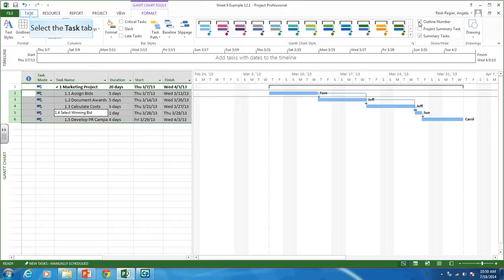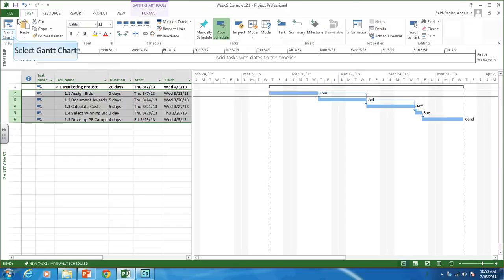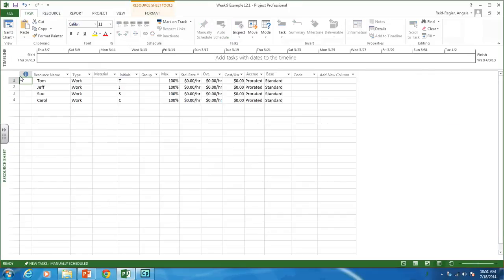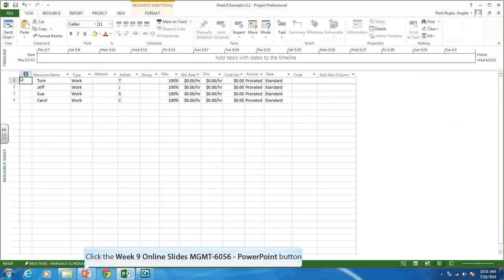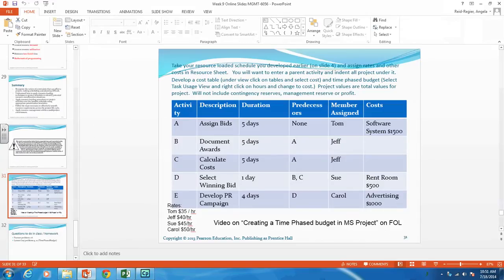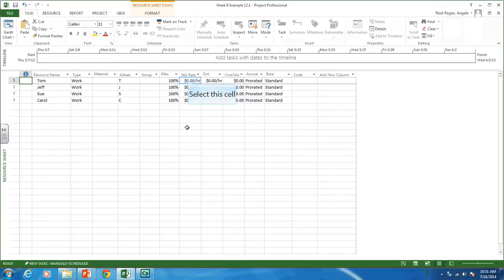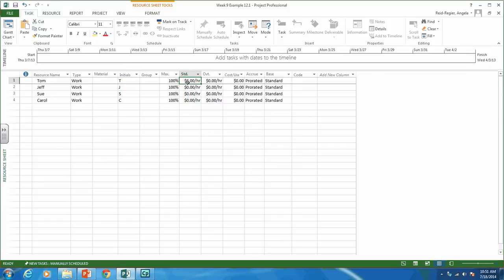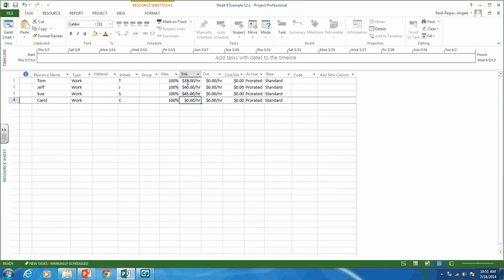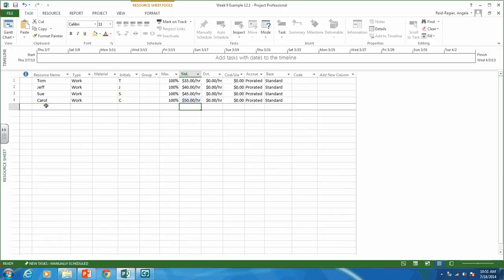Now we need to assign rates. Go to the task tab and select the resource sheet. We're going to assign rates to the different people. From the slide, Tom is $35 an hour, Jeff is $40 an hour, Sue is $45 an hour, and Carol is $50 an hour. You can see there's a column for standard rates. For your deck project, you'll want to enter the rates for your supervisor and two laborers here. Tom, Jeff, Sue, and Carol are already assigned to specific tasks in the project, so that takes care of our labor.